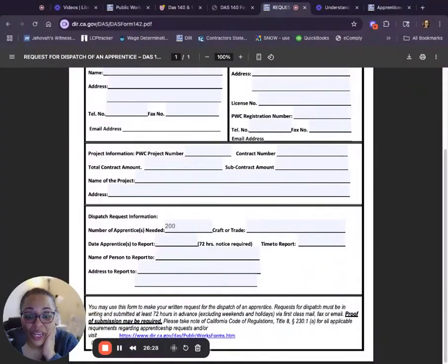Again, we continue to read. You may use this form to make a written request for the dispatch of an apprentice. Requests for dispatch must be in writing and submitted at least 72 hours in advance. So your client cannot call you on Monday and say, hey, we're going to be on site Tuesday. It's our last day. We're done. Why didn't you tell me 2 weeks ago you knew you were going to be on the schedule for Tuesday?